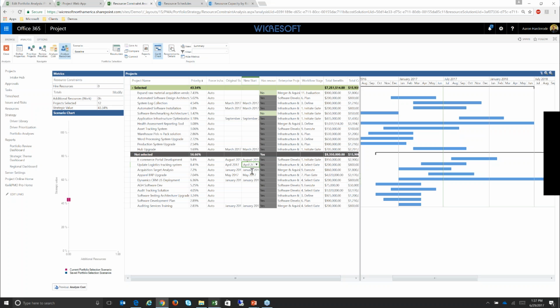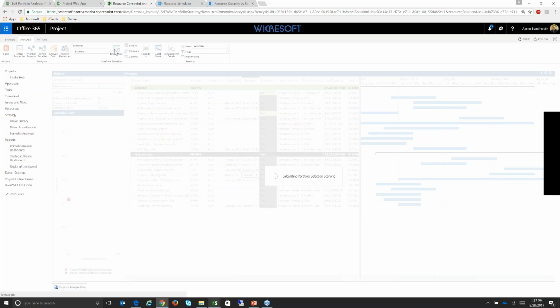But for anything that hasn't begun yet, what if we move it out several months and start it a little bit later? So that Gantt just moved out here. I'm starting it a whole year later than I planned. If that's feasible, then maybe we'll do that. Maybe start this one just a few months later. Again, what I'm trying to do is have the overlaps of resource requirements, or resource constraints, less impacted. And I can recalculate once I've played around with the schedule.